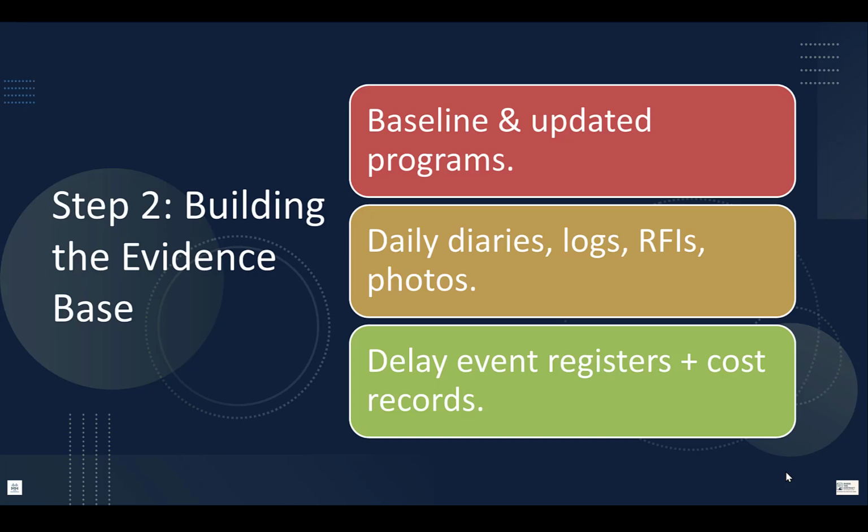Resource loading may strengthen evidential weight, but is typically an industry practice rather than an express FIDIC requirement. The program should reflect realistic durations, must have a clear critical path. This is very crucial. It should be approved by the engineer or the employer, or at least approved with comments, at least.